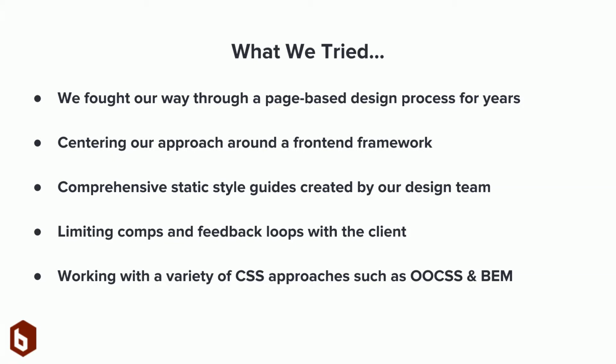So this was one of our worst ideas, I think. We kept the client in the shadows on a lot of the pages. We would limit the number of comps and give them a taste of the site itself. And this ended up with a lot of holes in the end process and a lot of expectations that weren't met once we would turn over a functioning website. And then we also dabbled in a bunch of different CSS approaches and methodologies like object-oriented CSS and BEM.